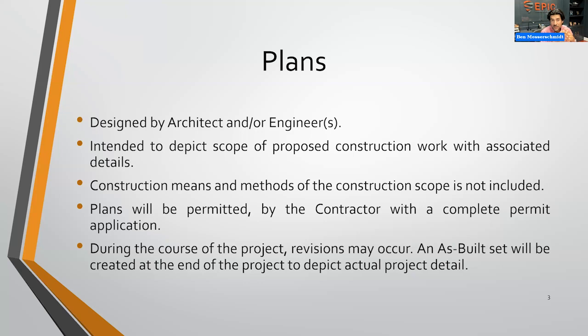Doing some level of due diligence on the front end to narrow the upper and lower bounds of what you intend on having from a bidding standpoint is going to be critical. And the more preemptive work you do on the front end, the narrower and tighter, ideally, you can have your bidding process and hopefully have a successful project, as far as not being one of those cases where you start off with a small project dollar wise and end up with a bear at the end of it. I'm sure everybody's heard those horror stories, but planning and preparation on the front end when you are not under the gun, so to speak, is going to reap substantial benefits.